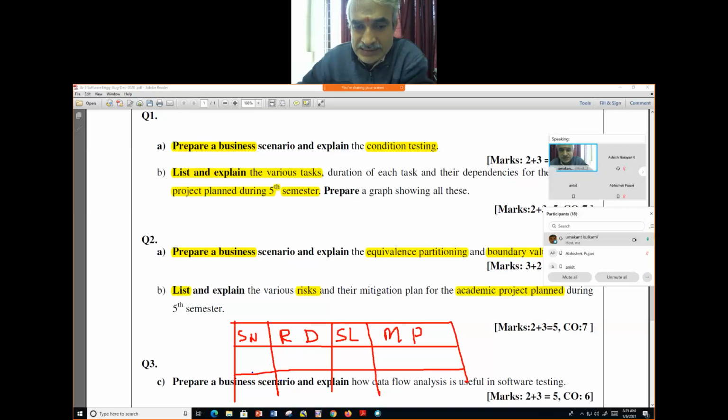Yes. Then risk number 1: importing the brain signal capturing device from USA. Assume. Severity very high. You can write it here in the bracket: high, moderate, low, very high. It will hamper the entire project. In that case, what is the mitigation plan? You can write the description here.